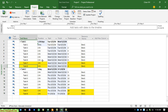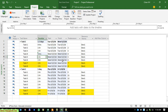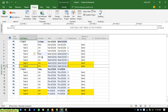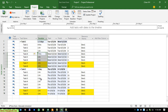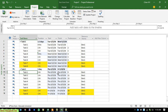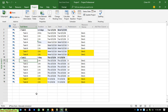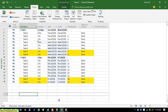If I increase sub-task 4 to 2 hours, then the total for sub-tasks 4 through 8 becomes 6 hours, so there are no hours left for another day. That means all of Task 2 moves to the third day. I hope this video is helpful — this is a basic example of how to change the working time in your project to match your company's working hours. Let me know if you see any issues. Bye bye and see you later.